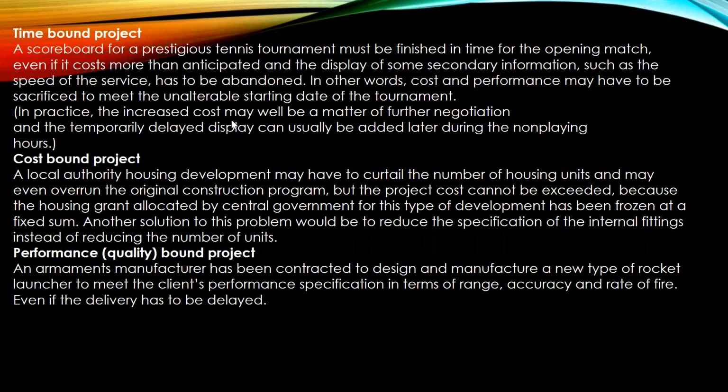As a cost-bound project, there's a local authority housing development. It may have to, let's say, curtail the number of housing units and may even overrun the original construction program. So as an example, but the project cost cannot be exceeded. This is another example of a cost bound. So this is the bound that has to be respected. In the first example, talking about the World Cup, there's the time bound at any means necessary. The time bound should not be exceeded. Now there's somewhere that the cost should not be exceeded.